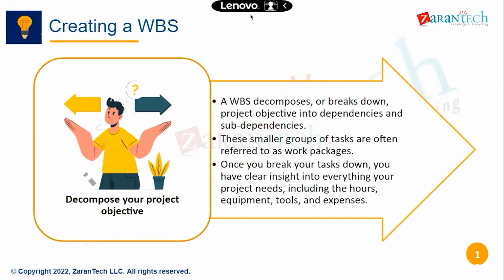With a work breakdown structure, you should mainly be able to understand what the scope of work is, and break it into deliverables, identifying major and minor activities in terms of budget or plan. Then it will be a framework in terms of cost, time, or schedule. For every task, we should say who is working on it, what the timeline is, like 3 months, 6 months, 1 week, 1 day, and how much cost is incurred. All three should be added for every box in the work breakdown structure.